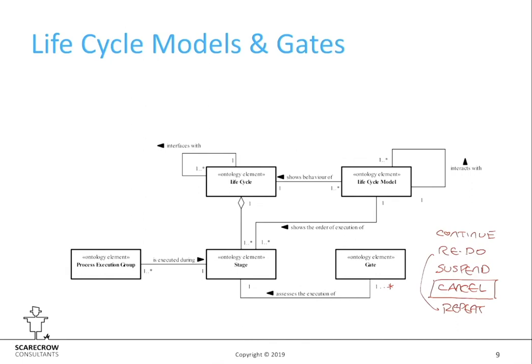So that brings in the concept then of the life cycle model. And the life cycle model is behavioral. This is the actual set of stages selected from the life cycle. So just because a life cycle might list 5 or 6 stages that are available, conception, development, or whatever, you may not, as an organisation, have to be involved in all of those stages. So you may only be doing conception work for somebody, for example. You may not ever be doing any development.